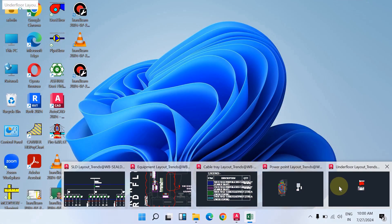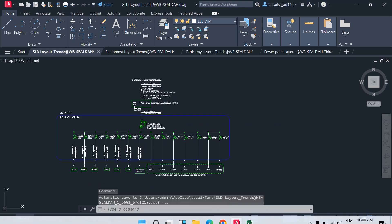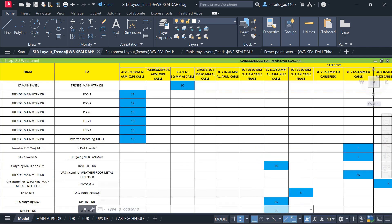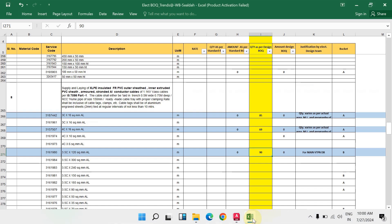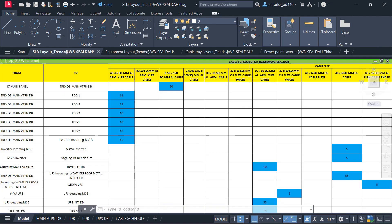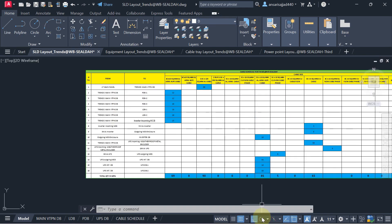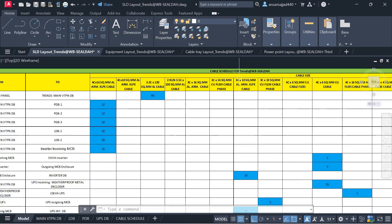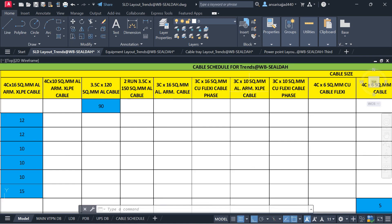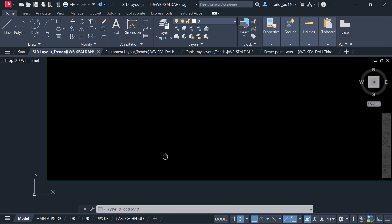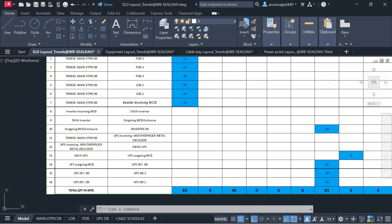I have already prepared the cable schedule in the schematic. You can see 3-core 10 sq mm aluminium XLPE armoured cable — 3-core 10 sq mm aluminium — the total is 85 running metres. I have written 85, and you can see where it is used: from the 6 kVA UPS to the UPS outgoing MCB.